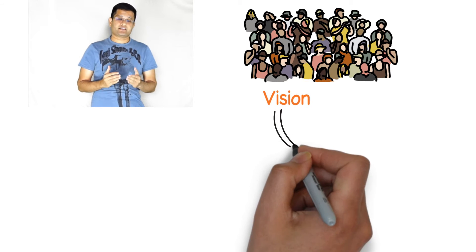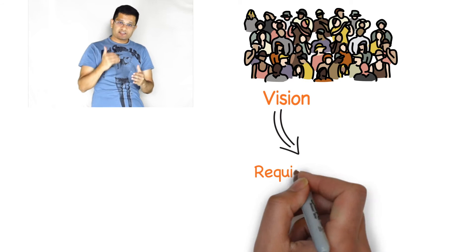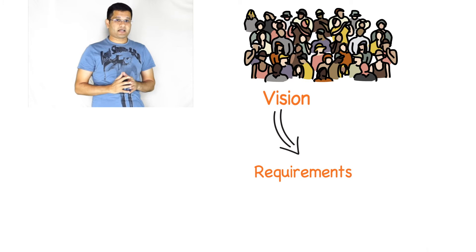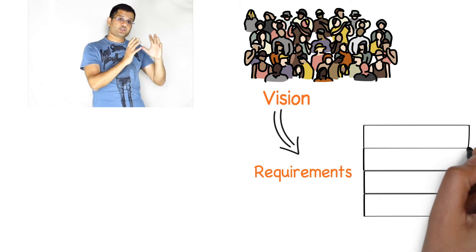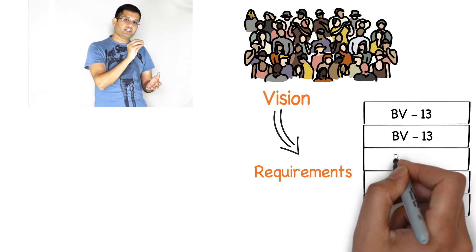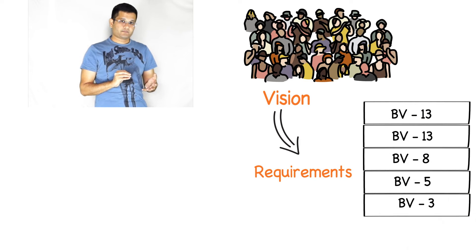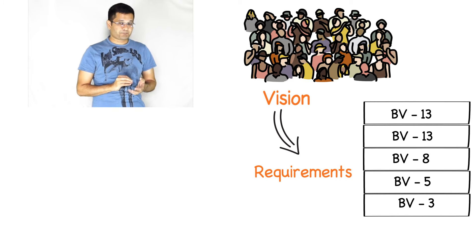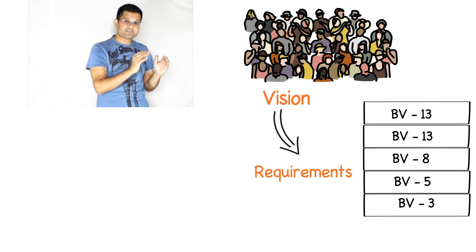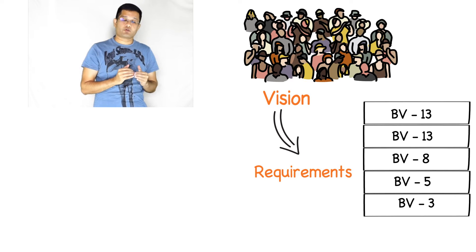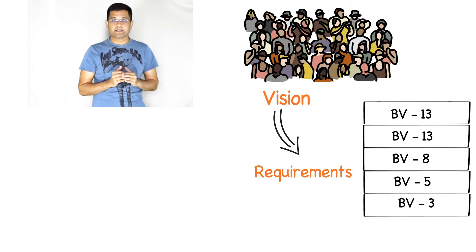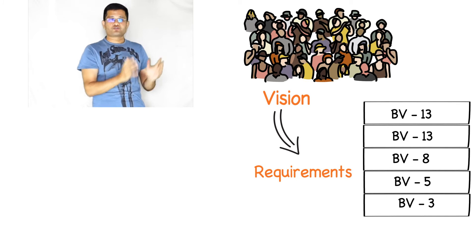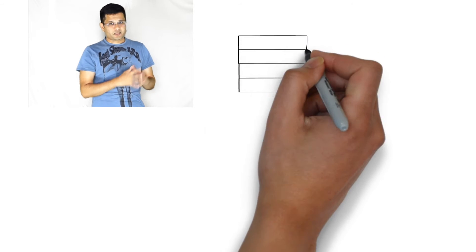From the vision you start deriving the requirements. These requirements go into the product backlog and you give a business value to each of these requirements so that it will help you in prioritizing. You have to remember that these requirements are very high level requirements and they need further refining.